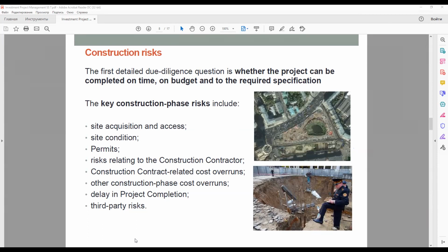Conversely, land which has been used for farming, residential property, offices, or warehouses would usually be considered low risk. A high risk may have to be treated as a compensation event under both the project agreement and the construction contract. And here is an example from my experience.